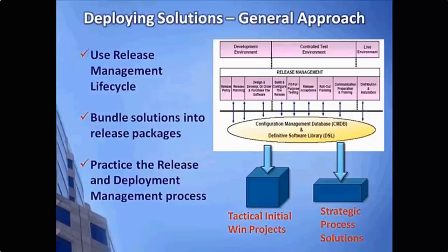Again, as you deploy your solutions, the release management process can be used to bundle efforts across all the teams into release packages. This minimizes the effort and the amount of disruption that might occur when deploying new processes and your initial win solutions. Another benefit is that this allows you to practice some elements of the release management process and prove its benefits. That's why I use the term bootstrapping. You're using ITIL to implement ITIL. What a great concept.